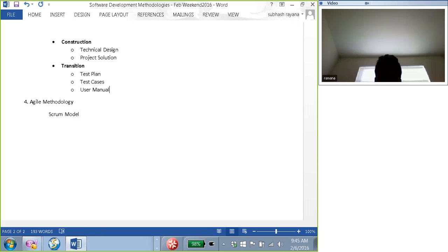I had several instances where the development was in progress, and the business comes back, and they're like, "Oh, Subhash, this is a very small change. Can you just take care of it? I don't think it's going to take much development activity." They don't know what development activity is required. It's incorrect. They assume that it's not going to take much time, but the actual time required is only estimated correctly by the technical team.